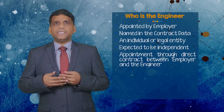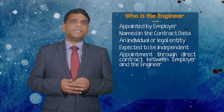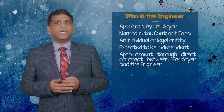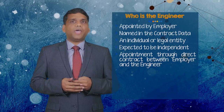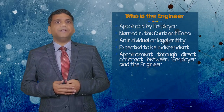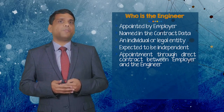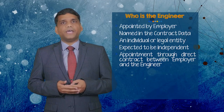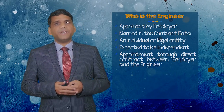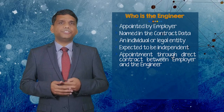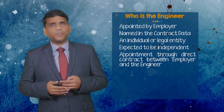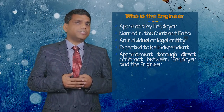Now let us talk about who is the engineer. The definition of the engineer is given in sub-clause 1.1.35. According to it, the engineer is the person appointed by the employer to act as the engineer for the purposes of the contract and named in contract data, or another person appointed from time to time by the employer and notified to the contractor under sub-clause 3.6, replacement of the engineer. These days, generally, the engineer is a company or corporation — a legal entity — as opposed to an individual or natural person.